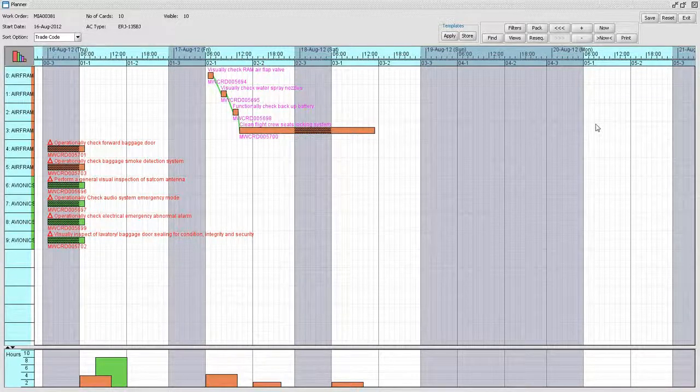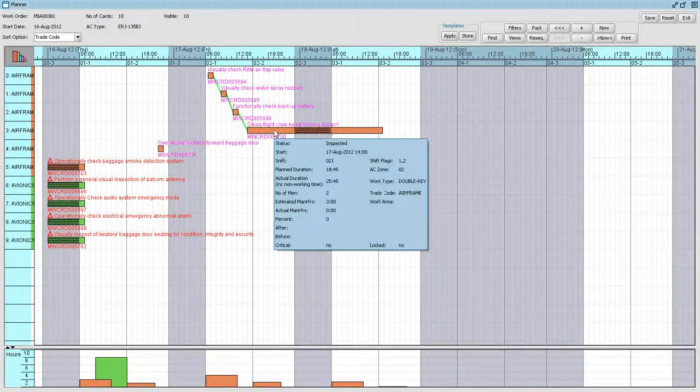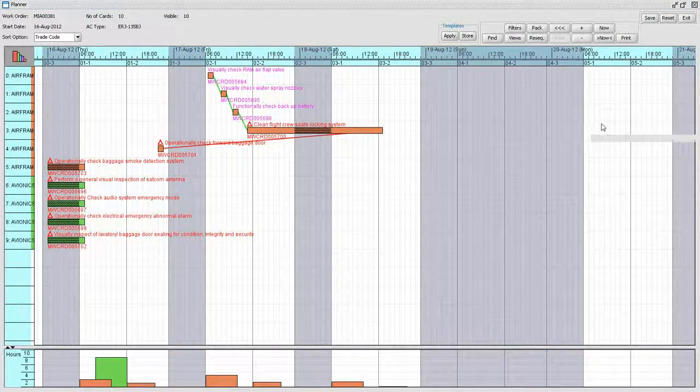If the successor starts on or after the predecessor, the line is shown in green. If the successor starts before the predecessor, the line is shown in red. This also causes a card to be flagged as having an error, indicated by a red warning triangle, and by having the title and number details also shown in red. Hovering over the item gives a tooltip containing brief details and indicating what the error is.